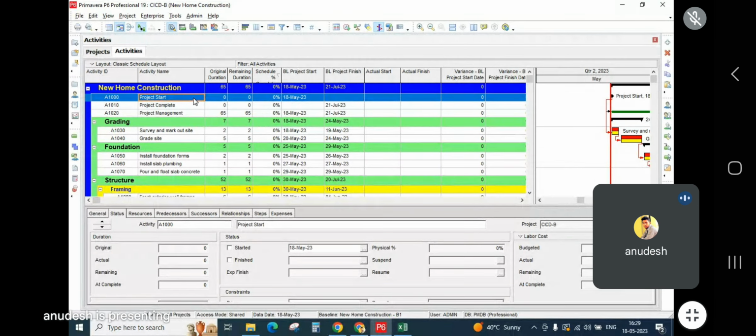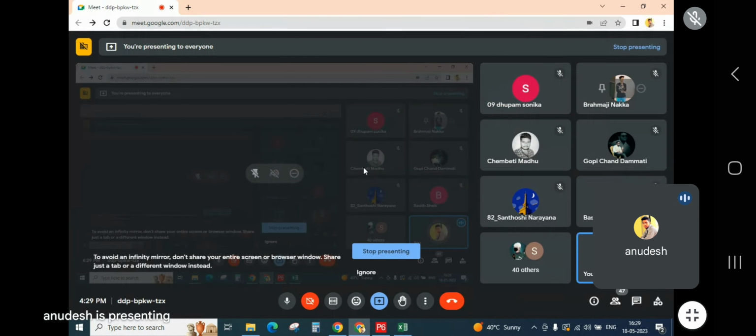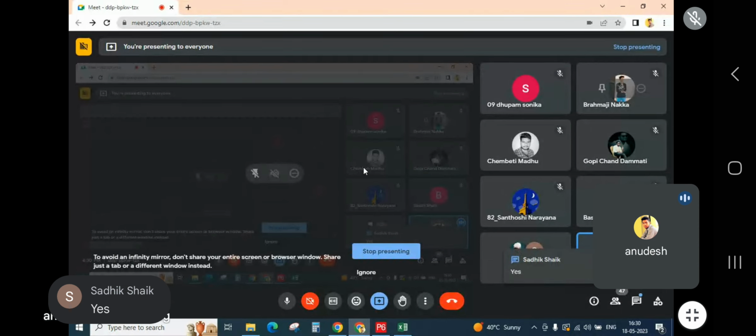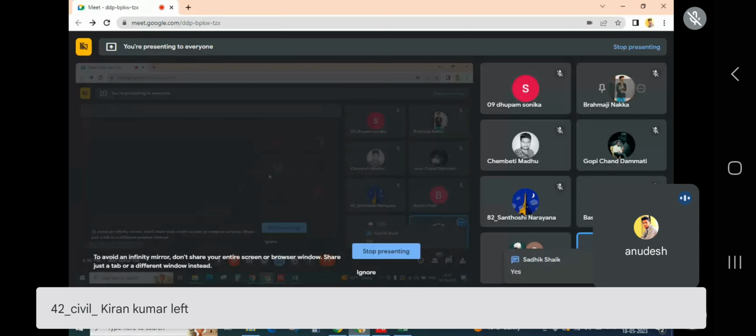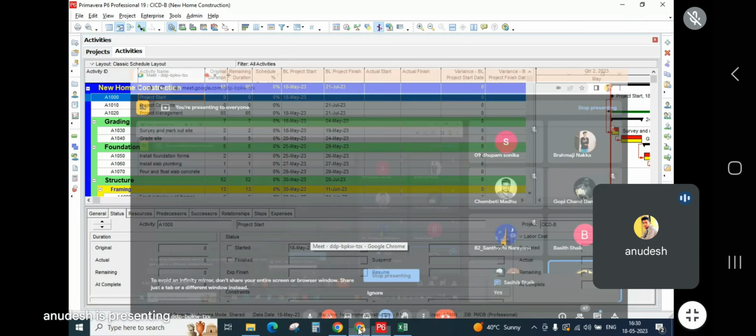Now, since almost all the activities in your project are critical activities, that means if any of these activities gets delayed by any single day, what will happen? Your project will get delayed or not? Say yes or no on the chat. Come on, just a simple question I'm asking. Every activity in your project is critical. So yes, your project will get delayed.